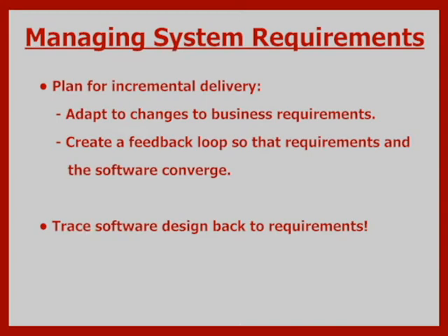With frequent incremental deliverables, it is much easier to get feedback from stakeholders and to identify anomalies in the software product versus what the system requirements intended, and to respond to those anomalies appropriately, whether that means adapting to new system requirements or making sure that the software product validates against the system requirements.